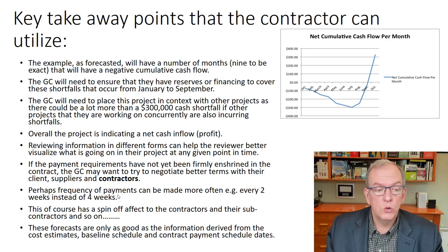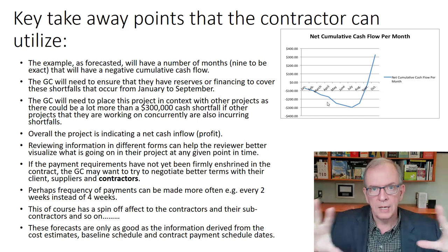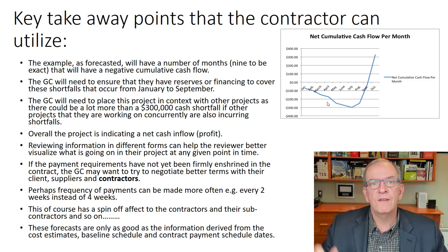Make sure that you are billing in a very timely fashion. Do not miss billing dates just because you're busy working in the project. You've got to work on the business if you want to be successful. And the forecasts that you're making here are only as good as your ability to lay out and develop a really good schedule in advance for the work.